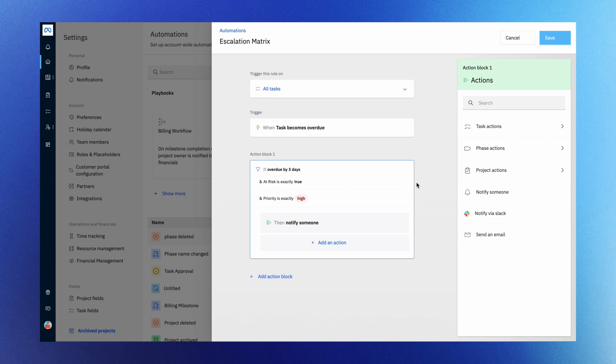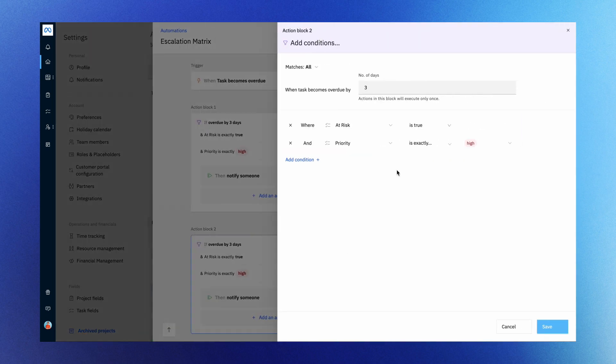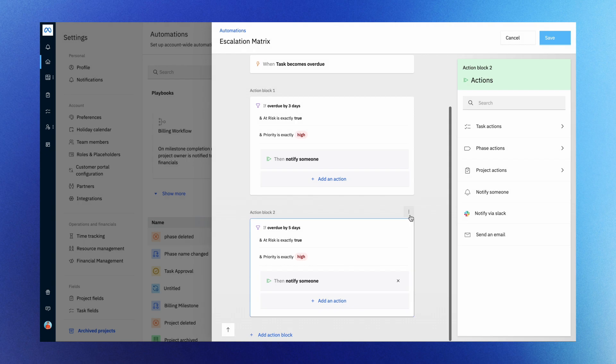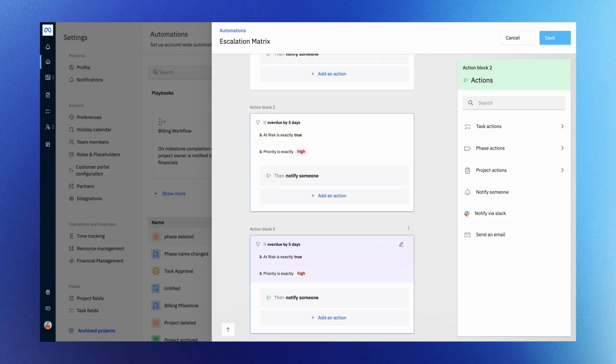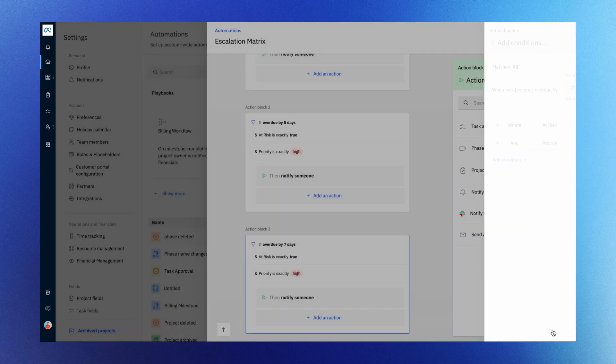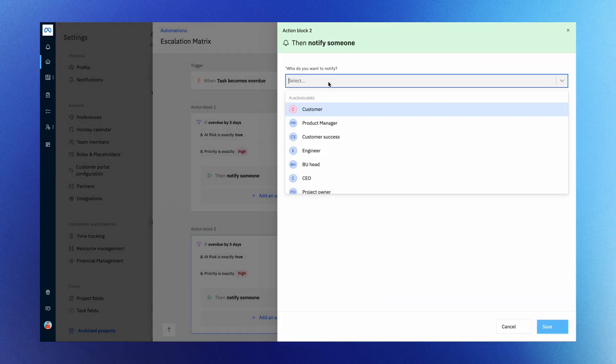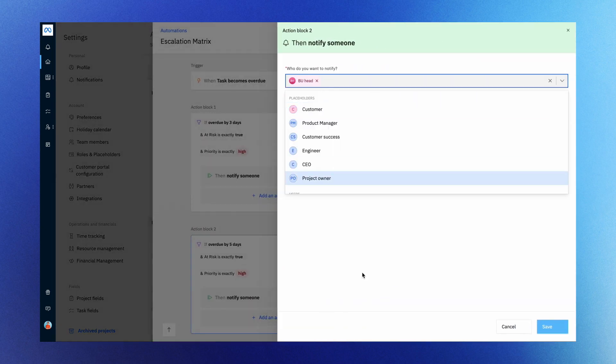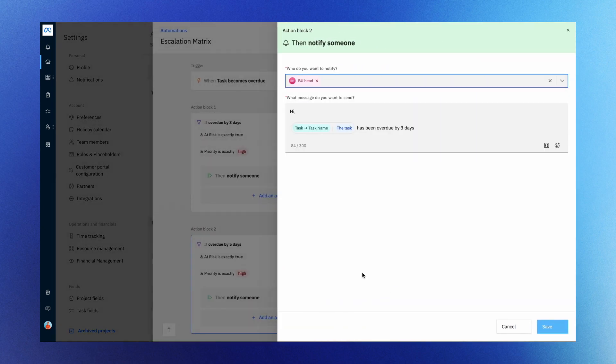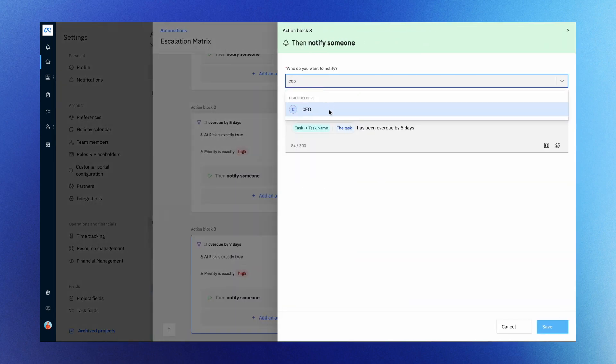Automation rules have multiple action blocks per executing a sequence of actions. To establish an escalation matrix for overdue tasks, you can just duplicate action block 1 and edit the conditions as 5 and 7 days, triggering notifications to project stakeholders, BU head, and CEO.